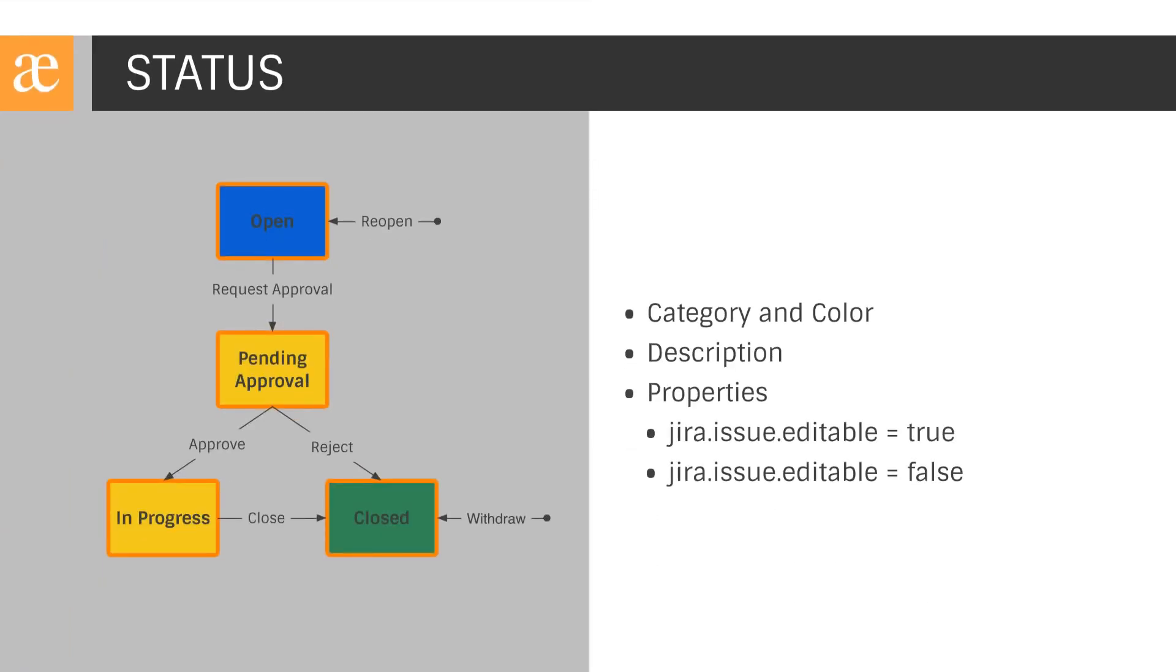Status describes where a workflow item is in its lifecycle. Administrators associate a category, color, and description of statuses when creating them. These colors can be seen through the application and in Jira Agile progress bars. New or blue statuses indicate the beginning of a process. You can also use this for describing handoff statuses that indicate new work for a team. Think about handoffs like that between a software developer and the testing team.